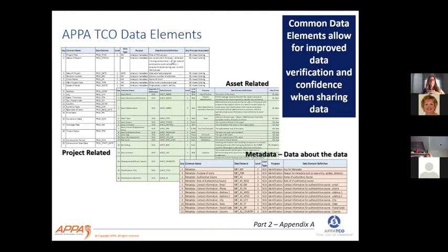When we do projects, we have our equipment list, and the maintenance group uses that equipment list to do work orders off of. When a project comes along and that project related data, we don't tie that equipment, no equipment, not even the roof, to that project in our system. And it's the same system, it's still in Famous. But for whatever reason, we have not gotten into good practice of tying that asset to that project.